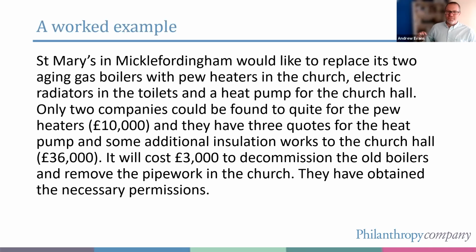St Mary's would like to replace its 2 aging gas boilers. It's got 2 gas boilers with pew heaters in the church and electric radiators in the toilets. And then in a separate building, which is the church hall, they'd like to install a heat pump because that gets much more intensively used. They could only get 2 companies to quote for the pew heaters. It's going to cost £10,000 to put them in. And they've got 3 quotes for the heat pump and for some additional insulation works to the church hall to make that work, the cheapest and best of which was £36,000. It's going to cost them £3,000 to decommission the old boilers and to remove the pipework in the church. And they have already obtained all the necessary permissions.